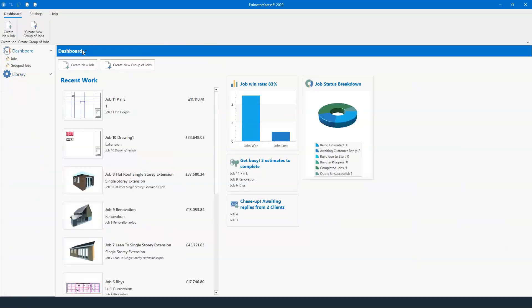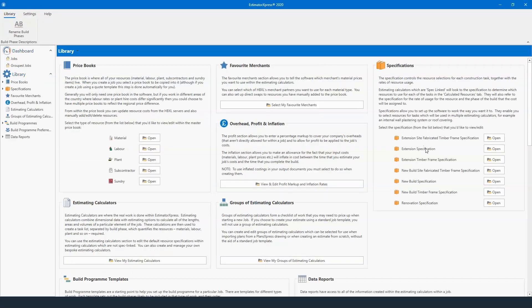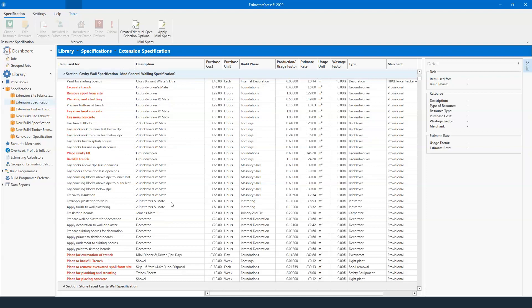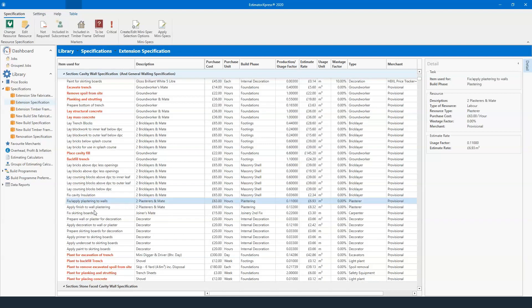Back to the dashboard before we go into an estimate — does anybody have any questions? So how would you change from two plasterers and a mate to a plasterer and a mate? If you want to do it as an overhaul across your company, just go into your library and find the specification you're following. My rule of thumb is to only ever focus on one specification — the likelihood is the teams you use across every job are going to be the same. I just use the extension specification. I can scroll down and find where we've got our plasterers.